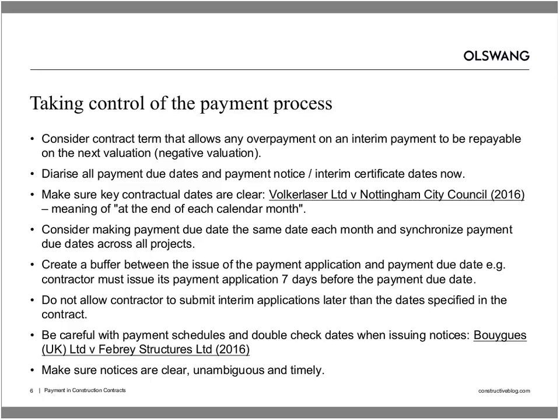There's some flexibility there, so that you can create a buffer between the issue of the payment application and the payment due date, and make sure that you give yourself a week or whatever you think you need to consider properly the contractor's payment application. And don't allow the contractor to submit applications outside of the contract procedure.